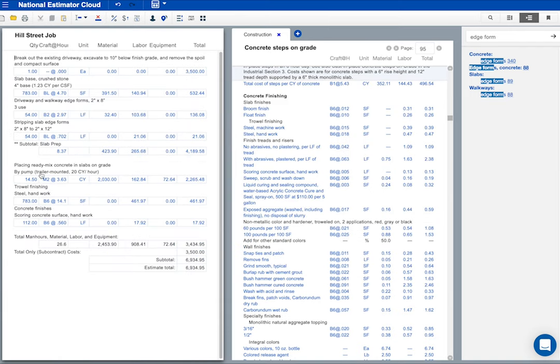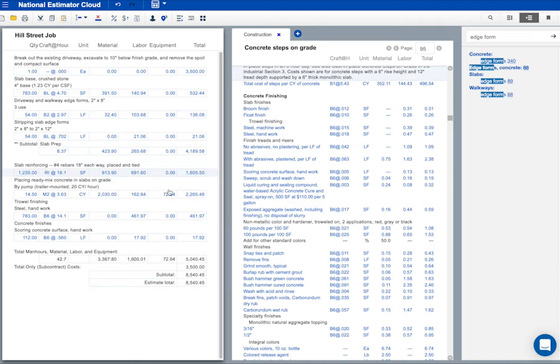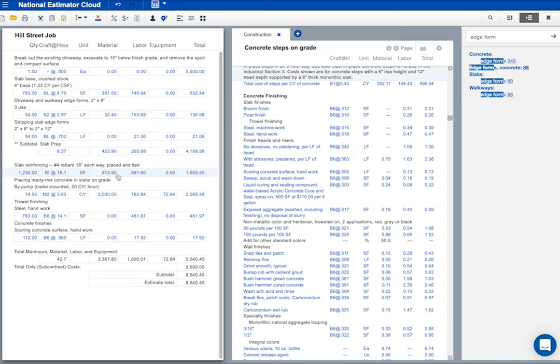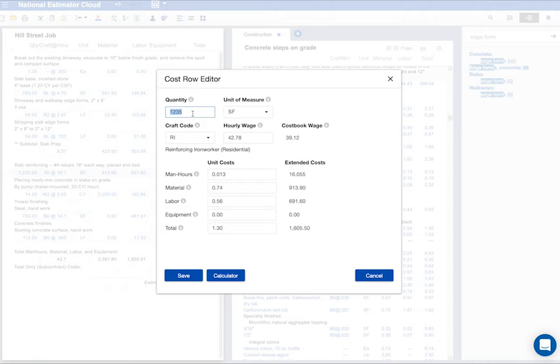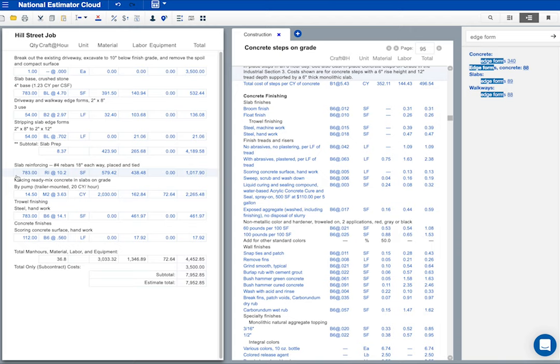Here are the rebars. I'll select and click to copy. And then go back to our Hill Street job. I'll click where these costs belong and select paste after. Okay, we've got an estimate for the steel. But the quantity is wrong. The slab on the Spring Street job was 1235 square feet. This slab is only 783 square feet. Let's make the change. I'll double click on that line to open the cost row editor. I'll type the quantity 783 and click save. That looks okay. We're done.